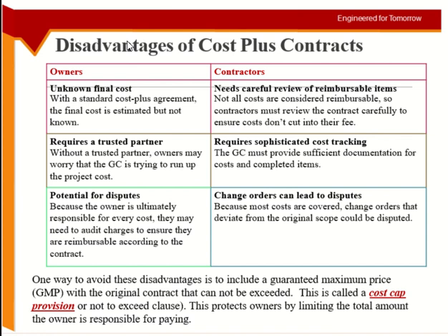So you cannot tell me, don't worry about the cost, you ask for 10 columns, I have 10 columns, pay it for me. Okay, you cannot say this. No, he will say, what was the cost, tell me. How much material was consumed, how much labor charges you gave, and so on and so forth. Okay, so more accurate cost tracking is required.